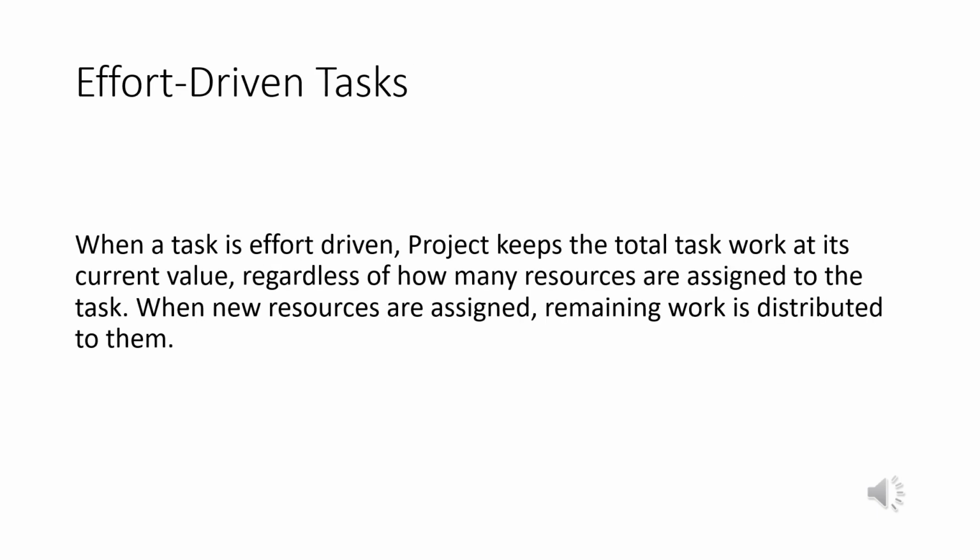So effort-driven tasks, these are tasks that have a set amount of work, no matter how much resources you throw at it. So for example, Gary Clark's supposed to plant some trees and things. If you want to do that faster, you could throw more resources at it, 20 more people at it, and the trees will get planted faster. But there are other tasks that aren't effort-driven tasks. Say you're going to change over the slitter. It's a 2-3 man job. You want to get it done faster, you could throw 100 people at it, and what you'd have are 2 or 3 people working and 97 people standing around watching. It's not effort-driven. It's resource-driven.